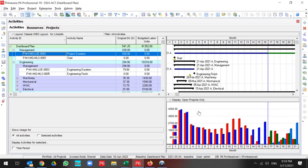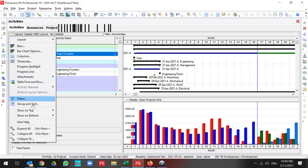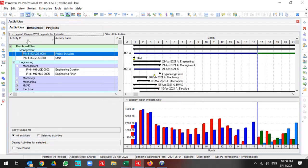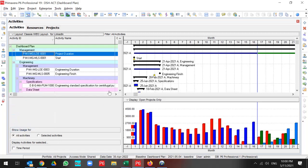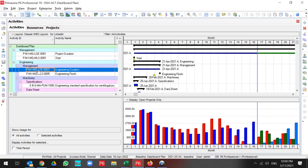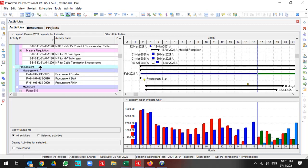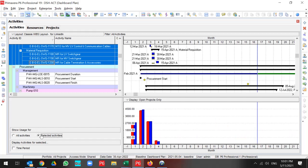The right pane shows you the curve and the left pane is for selection. I have the opportunity to filter for all activities or selected activities. If I expand all the activities and I want only this curve to show the engineering activities, I should select the engineering activities and then selected activities for engineering. Then, my curve updates to the engineering section.